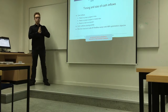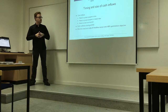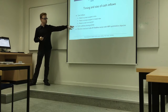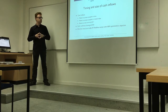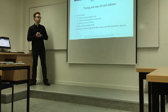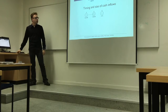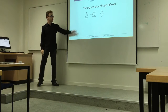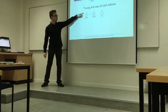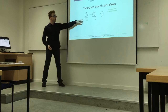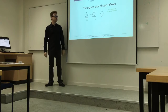What if we consider both timing and size of cash flows together? I discuss three payment models with different underlying assumptions, applying them to the discrete time-cost trade-off problem. Cash outflows are assumed to occur during the activity in a stepwise manner. To illustrate, consider a simple two-activity example where each activity has a duration, a cost, and a created value — the value created for the client. A compensation proportion of 0.8 determines the contractor's actual cash inflows.